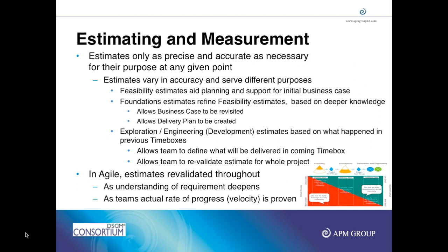These story points help us understand the velocity of the team, that is the speed at which we are going, how many story points we are able to deliver. Please remember, story point is only a number to understand sizing and complexity. It's not effort or number of days. And it's nothing new actually. In most software projects, companies use something called complexity estimates, or function points. It's a similar concept in Agile. It's just that they call it story points.